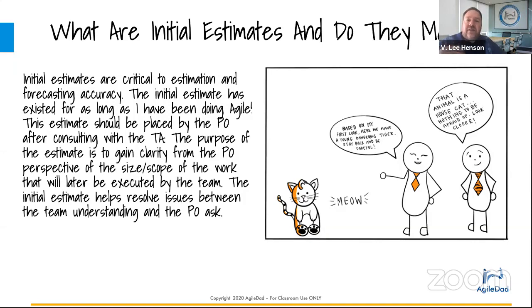But I think if you ask me for the top 3 components for a well-written backlog item, it would have a clear title and description, it would have clear acceptance criteria, and we'd have a clear understanding of the persona or target audience that this is going to address. And you may hear people who use the template as a who, I would like to do what, so that why. I'm not necessarily so fixated on a template as I am that you understand who the target audience is, that it could be easily consumable, and that the team as a group feels like they really have their head around what the work can be.